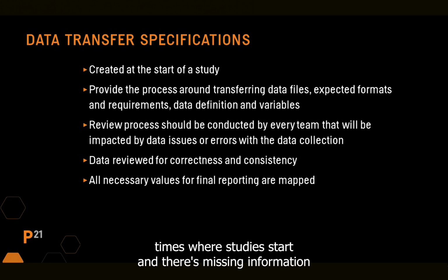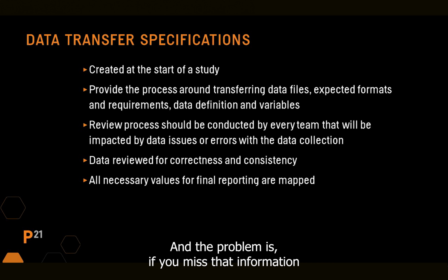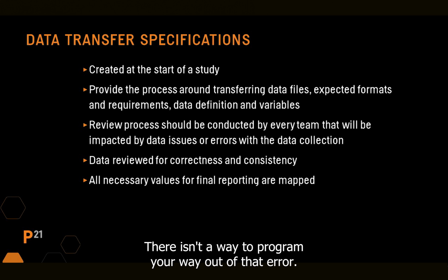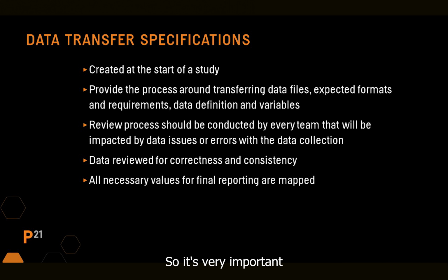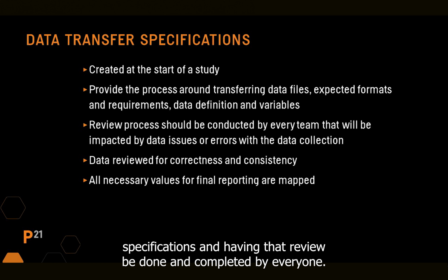I've seen many times where studies start and there's missing information that's required either to do calculations or to differentiate different records. And the problem is, if you miss that information at data collection, you can't go back and get it. There isn't a way to sort of program your way out of that error. So it's very important that a significant amount of time is put into creating data transfer specifications and having that review be done and completed by everyone.